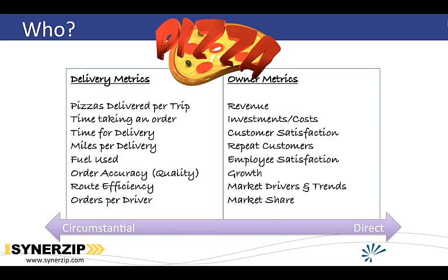We'll start doing things like trying to put points on every little bit of work that we do. Or I've seen teams create story cards for vacation for people, for technical debt items, for bugs, and you could argue one way or another with those, or meetings that they have. They start creating cards around these. Why? That goes to the first point of efficiency. We spend so much time doing these sorts of things because we think that we have to show a certain consistent velocity all the time, because there's a false sense of value around it. It's not value neutral.